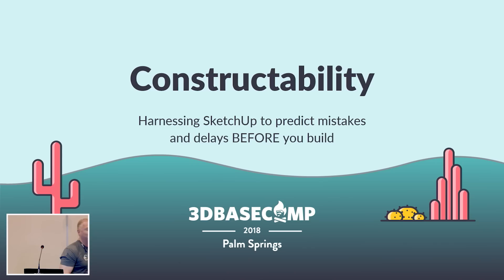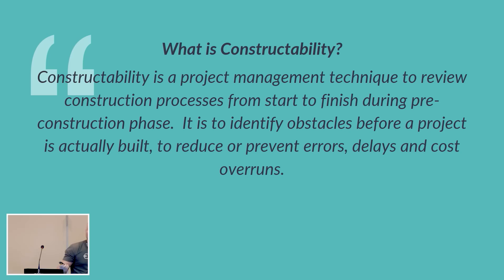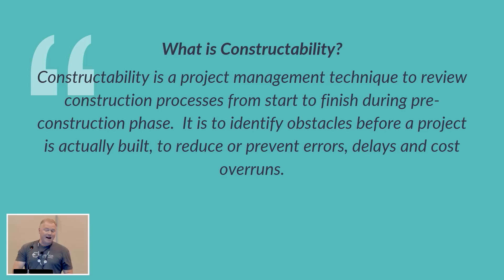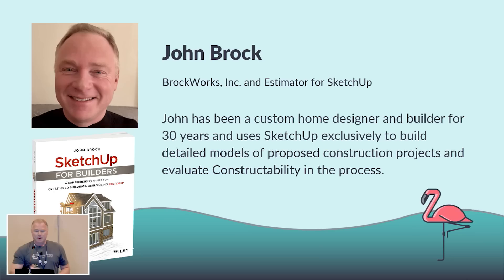Thank you guys for coming to my session. What we're going to talk about today is constructability and harnessing SketchUp to predict mistakes, delays, and issues before you build. Constructability is a project management technique to review construction processes from start to finish during the pre-construction phase, to identify obstacles before a project is actually built.